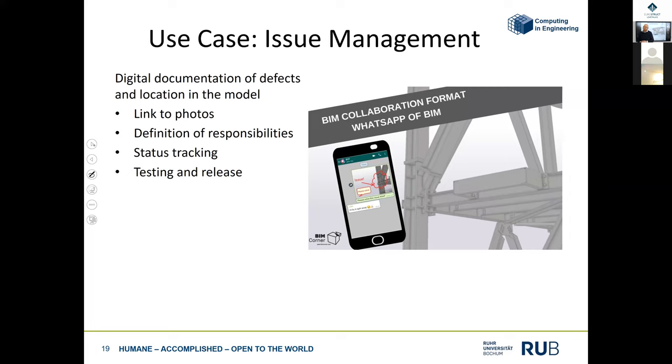If it's done, then he can also check it on the tablet and say, okay, I did this, and then you go to the construction site again, make a picture and add it to the model. So you can improve the whole documentation during the construction and, of course, during the handover of the structure in the end.